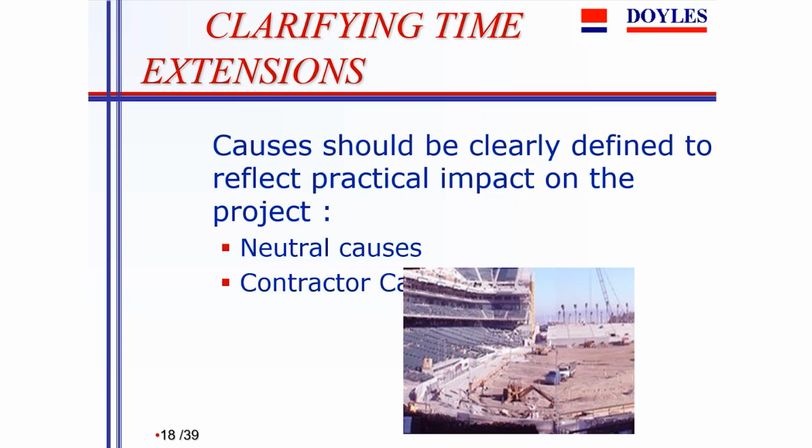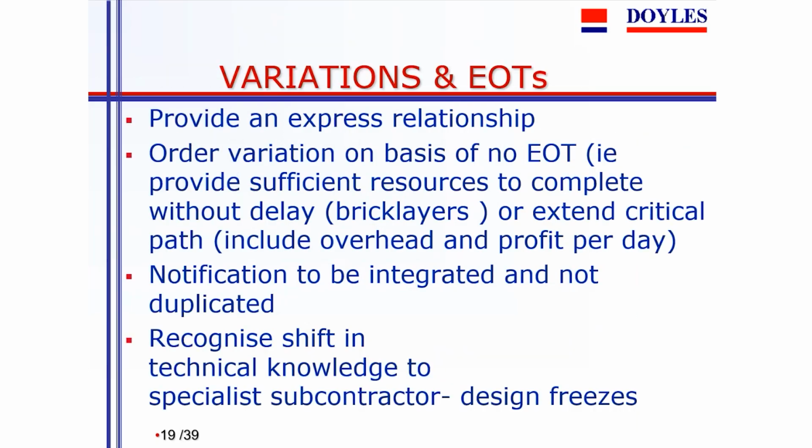And the next, I think. So variations and EOTs are often intermingled. Sometimes the variation doesn't cause any extension of time. If, for instance, you're told in good time that the main door should be painted white instead of blue, presumably if you haven't yet ordered the paint, it's pretty simple. The blue might be more expensive, but there should be a simple adjustment.